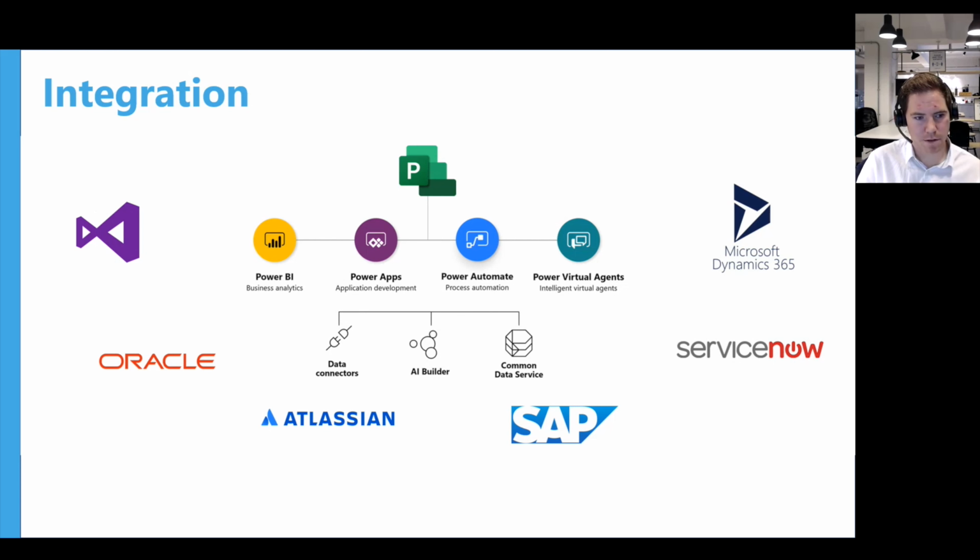And you've got data connectors as well. So using Power Automate, we connect to Oracle, SAP for invoices to say, for example, this task or this milestone is complete. This milestone needs payment. Therefore it's going to go off to SAP, create the requisition or invoice or whatever it needs to be. And that gets off and paid, and therefore you've got accurate portfolio data in your Power BI dashboards. But the level of integration is quite impressive. We have customers that are using things like ServiceNow, so we're doing some integration with that at the moment. Oracle, Jira, obviously Dynamics 365, and all those other technology services.